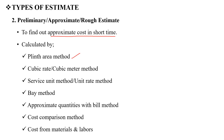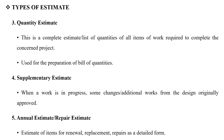The methods for the preliminary estimate include: the Plinth Area method, the Cubic Rate or Cubic Meter method, the Service Unit or Unit Rate method, the Bay method, the Approximate Quantity with Bill method, the Cost Comparison method, and the Cost from Materials and Labor method.